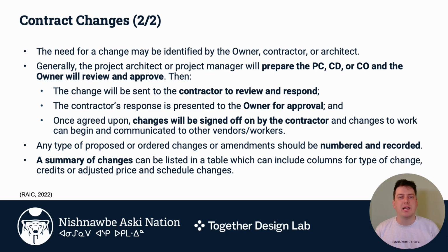Once then everyone has agreed and the change signed off on, every amendment should be numbered and added to the contract. And what you might choose to do is have a kind of ledger of amendments that summarizes at a high level what happens in each amendment and what the impact is on the timeline and the budget.